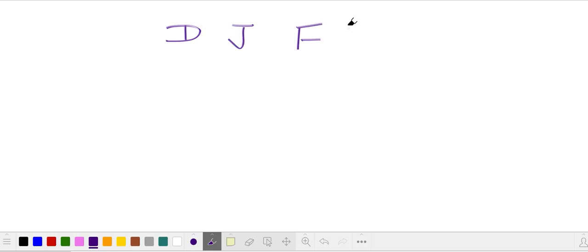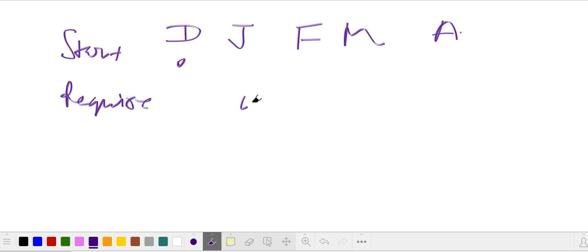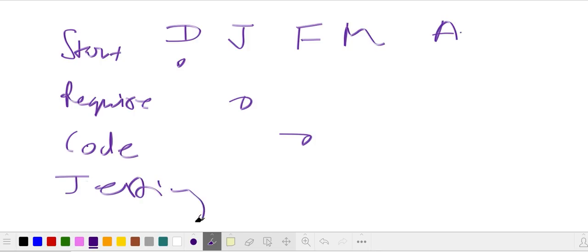So there is one more thing to remember. There is also a milestone chart. Why we use milestone? Let me tell you what the milestone exactly means. Suppose it's December, January, Feb, March, or April, and I'm saying, okay, we will start in December, and in January all requirements will be gathered. That is our second milestone. We will do coding, and by February our coding will be done. Testing, our testing will be done by May.